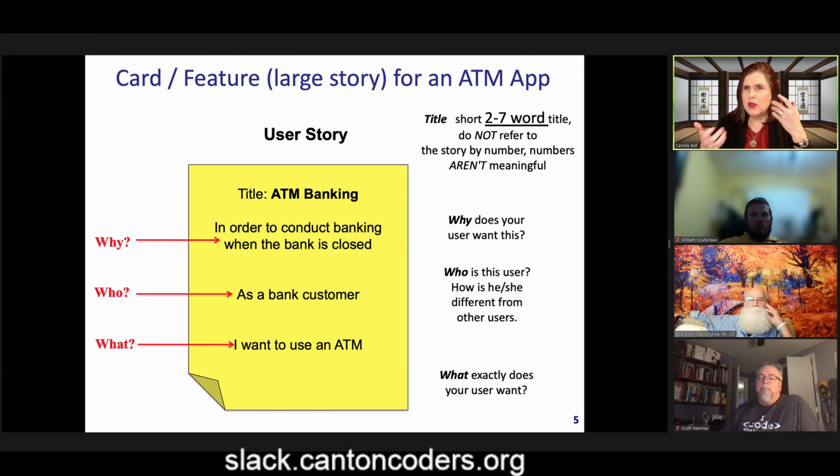What is a good thing to have? Well, you need to have a title. Now, if you're using one of these Agile project management tools or what have you, they'll give you JIRA numbers, or Rally numbers or VersionOne numbers. Do not use that. Use a title that anybody walking into or getting onto Zoom or Teams or WebEx or whatever with you can see from the title what you're talking about. 2 to 7 words, good size.